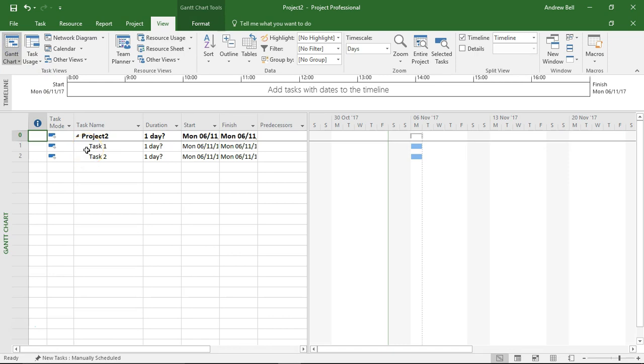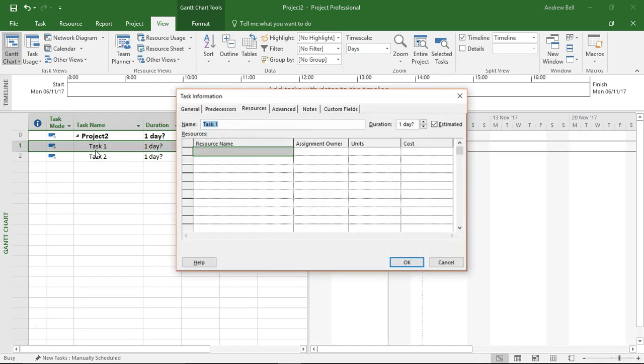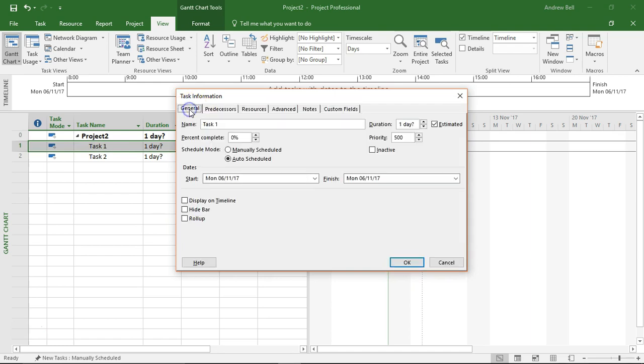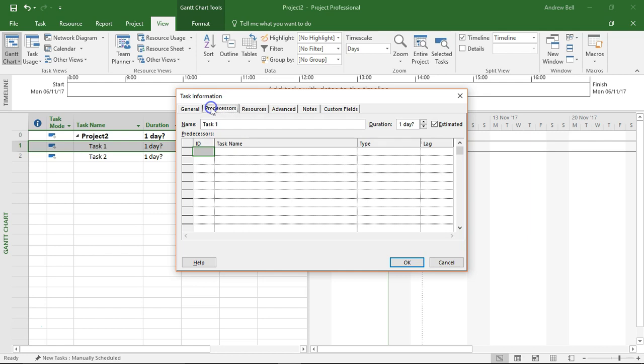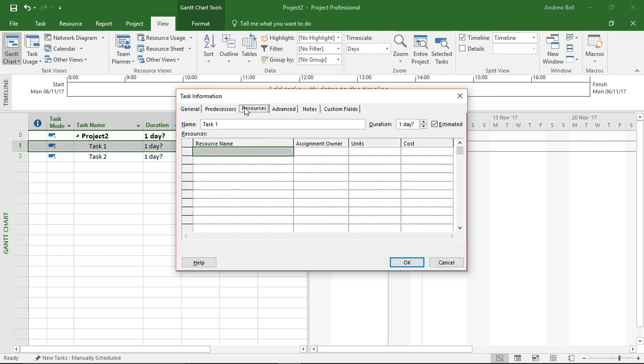Most people know that if we double click on a task we get task information, and this is where we can add general things about the tasks, the predecessors, the resources. I'm going to put Sam onto task 1 while I'm here.